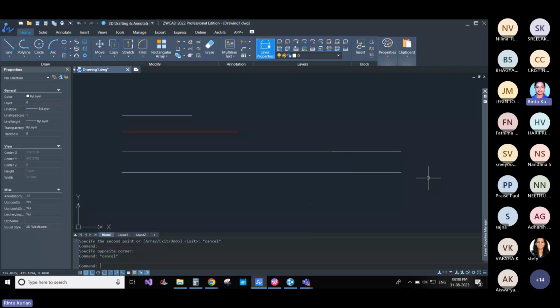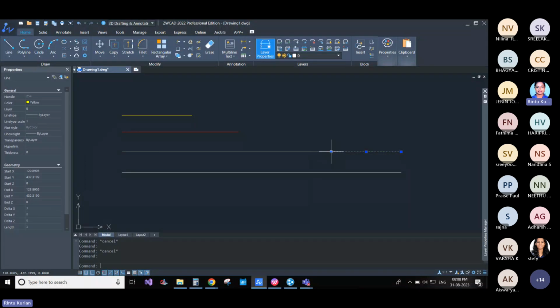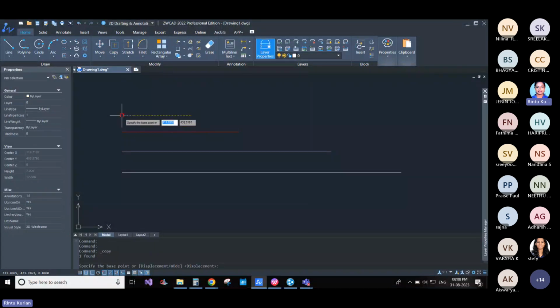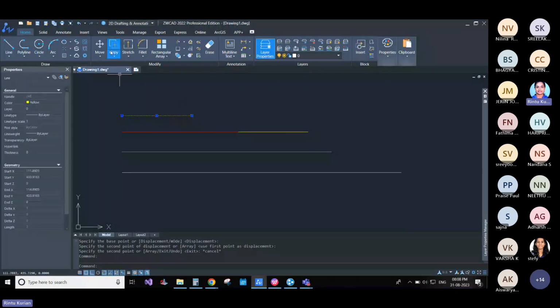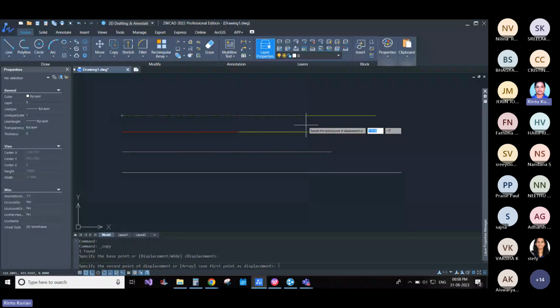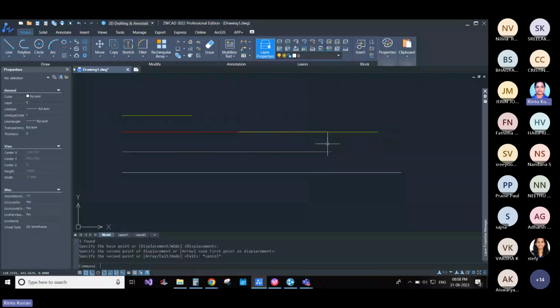If I'm not planning this particular cutting length and I'm cutting 5 plus 3 from one set, then I can only cut one 5 meter bar and 2 3 meter bars, and still I will have a wastage. If I'm going for this particular combination, then my total length will be nearly 11 meter. I'll have 1 meter wastage also. So instead of the 3 and 9 meter combination, if I have chosen 2 3 meter bars and one 5 meter bar, the wastage will be 1 meter. So I'll have to go through all these combinations to find the ideal combination when I have more than 3